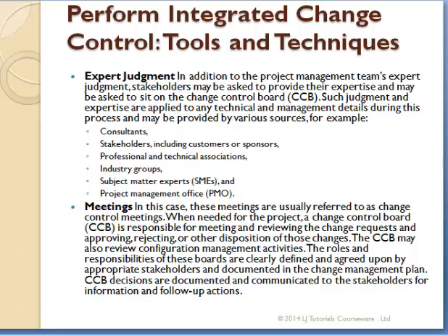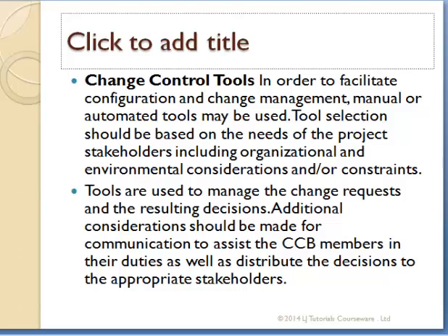Then also you have meetings, and most likely your meeting will be with the CCB, the change control board. Then also you can have a change control tool. The tools are used to manage change requests. I do not have a sample change request log here, but I will make it available to you guys. A change request log helps you to track requests. It's like an Excel document. You write the change request, then in another column you write the status of the request, whether it's opened, reviewed, rejected, or approved.